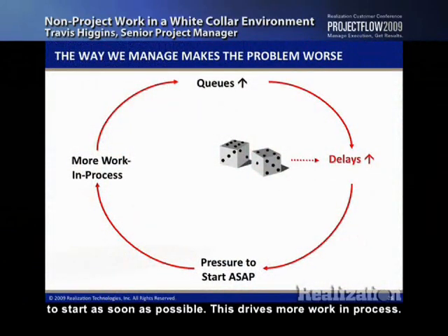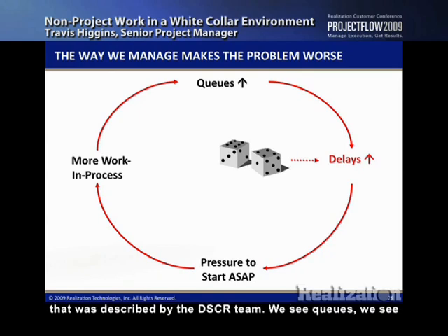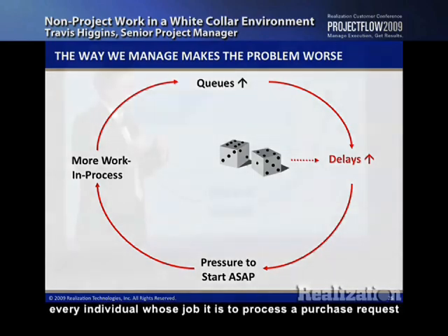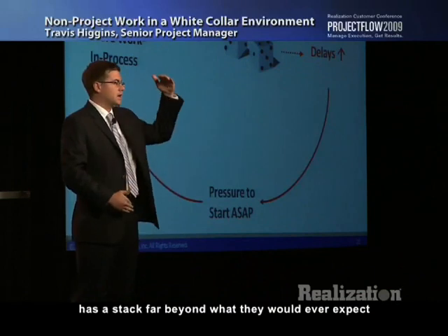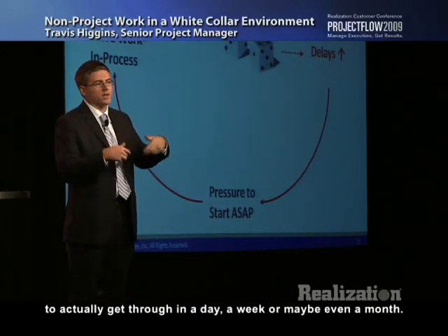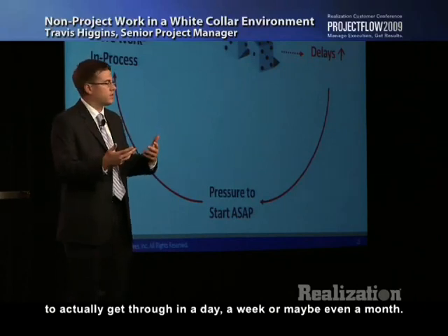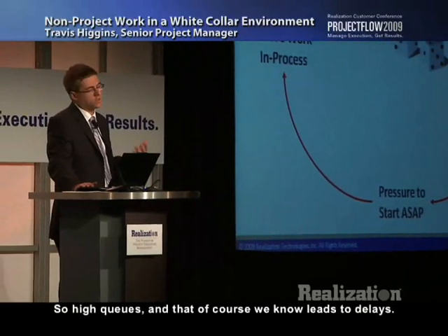This drives more work in process, and particularly what we see here are those huge crushing workloads that was described by the DSCR team. We see queues. We see every individual whose job it is to process a purchase request has a stack far beyond what they would ever expect to actually get through in a day, a week, or maybe even a month. So high queues, and that, of course, we know leads to delays.